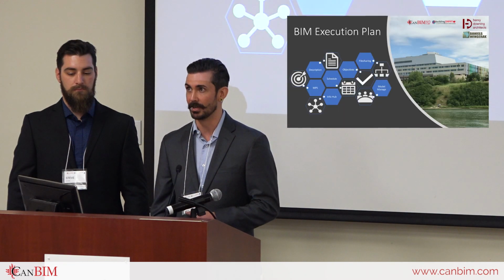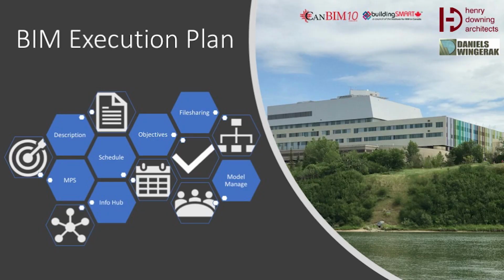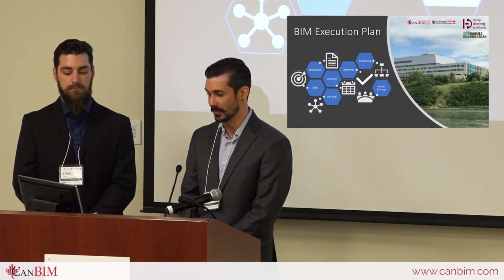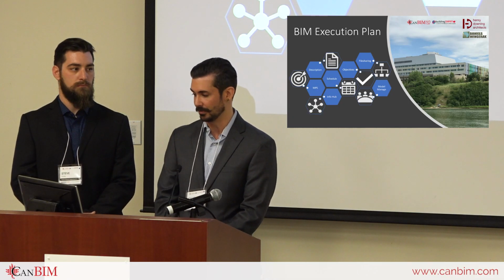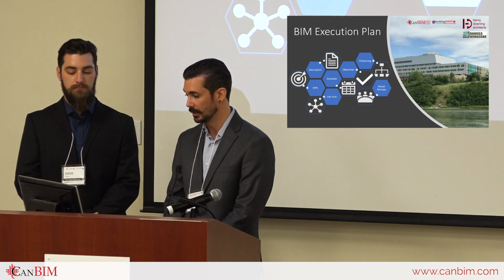So I'll give a little bit of a breakdown here of what was included in the BIM execution plan. It started with a description, just simple project information, including an overview, project name, project numbers, locations, contacts, just a bunch of information that you can always touch base on if you have any questions regarding that. The objectives were laid out clearly. We highlighted the objectives to make it clear what the model was to be used for and what data needed to be applied to the model to meet the goals. This included everything from analysis, cost estimates, coordination, and the contractor handover at the end.